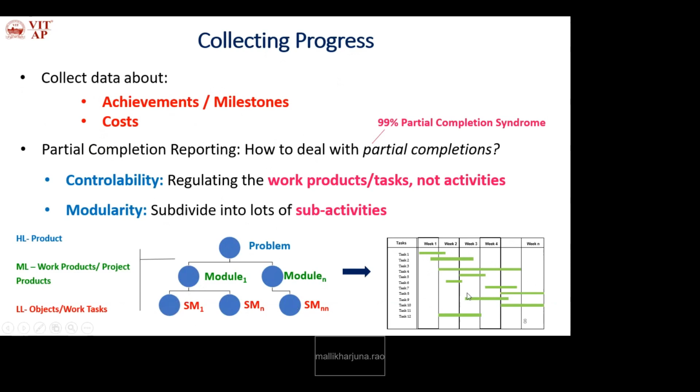Okay, so during this development, definitely changes are suggested. According to the changes we have to revise. So after modification, for the revised plan, we have to estimate the cost in terms of effort. So effort of the initial plan, effort of the changed plan.